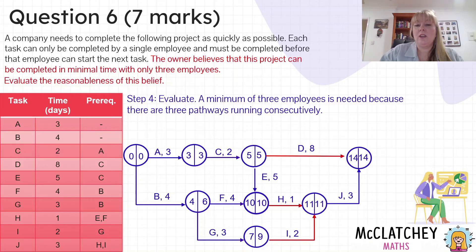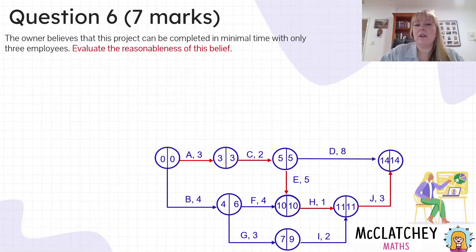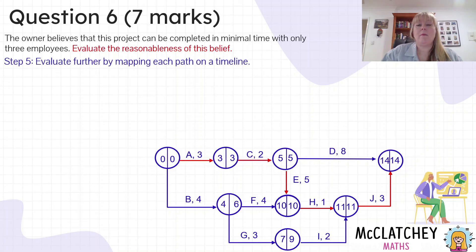We can see that we've got three employees working consecutively across C, F, and G, and also D, H, I, so that we definitely need at least three. It's very tempting though to think that we only need three. We really should map it out just to see if that works. So I'm actually going to map those pathways on a timeline.